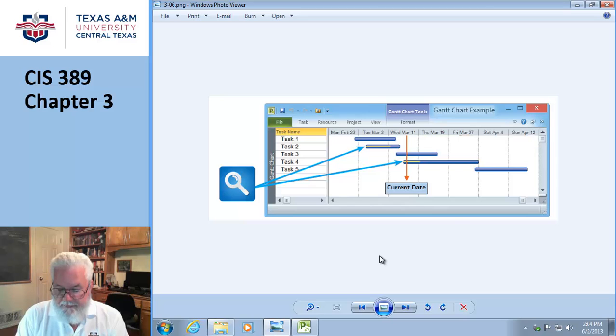So you have to identify the task in the WBS. That kind of makes sense. It must clearly identify each task and include an estimated duration. In addition to the tasks, either the task name or a task ID, one of the two, has to be unique. You can't say crane arrival, and then someplace else you put crane arrival a second time. I need to be able to know if that's the same item we're talking about or if these things are unique. So you have to have either unique names or a unique ID behind the name so that you end up with some clarity on what it is you're actually talking about.